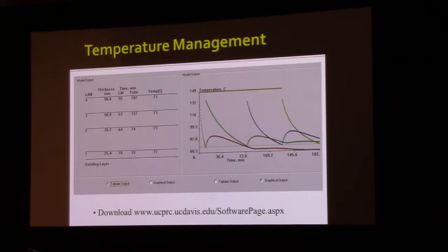So let's take advantage of these types of software so that we can be more efficient in forecasting how much we are actually going to get done in these 55 hours. Because one of the big things, the big hammer here, is a disincentive if the road is not open in time.